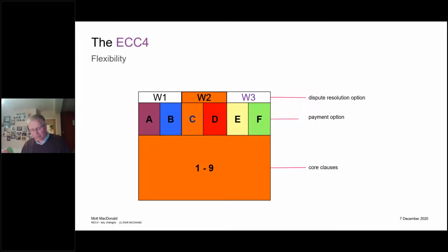If I don't talk about that more later, the dispute avoidance board is where, rather than wait for the dispute to happen and bring in an independent adjudicator to make a decision, we pay people who are good to come along once every 3 or 4 months, or whatever you decide is appropriate, to sit with the teams and try to tease out where disputes are coming from. The board then makes a recommendation to the parties, not a decision, but a recommendation. More detail on that may be coming later.